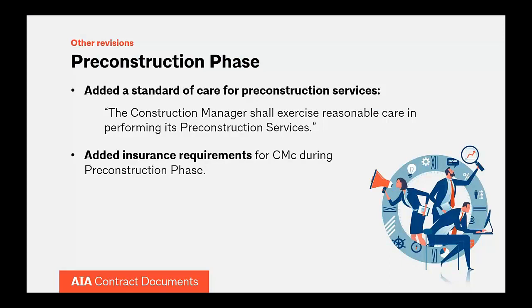This is another modification that we felt was important to reflect the changing role of the construction manager. With the CMC providing advice and consulting during the pre-construction phase, our task group felt it was appropriate to include a standard of care reflecting the professionalism that we thought ought to be associated with this role. Because there is no standard of care for CMs in the same sense that architects and engineers have one, this standard of care is more general than the one we have for professional registrants.